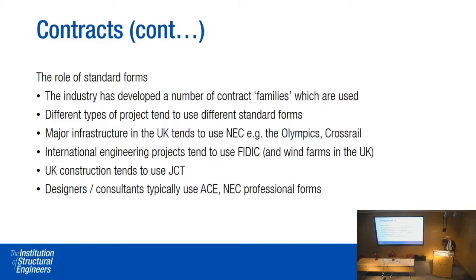The industry has developed a number of contract form families used for different types of projects. Major infrastructure in the UK tends to use the NEC — used on the Olympics, currently on Crossrail, and it will be used on High Speed 2 also. For international projects, FIDIC is a very common form, and it also seems popular here in the UK for wind farms. UK commercial building works tend to use the JCT standard forms.